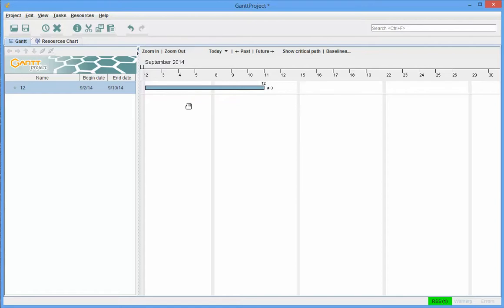So if your project needs to last weeks and you know that it's going to last 8 weeks, then just multiply by 5 working days per week and put down 40 days for that duration. I'm just going to treat all of these durations as days and just use the numbers right off that activity chart that we saw in the earlier problem.